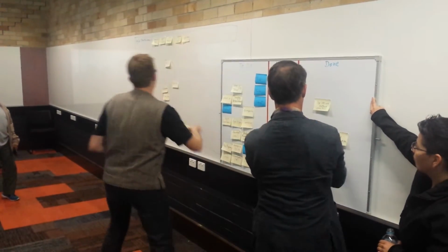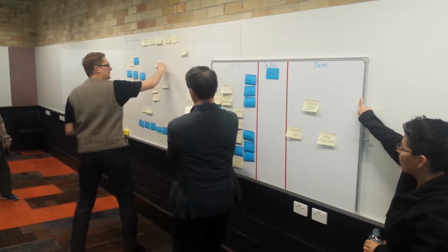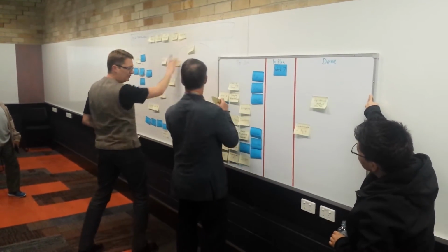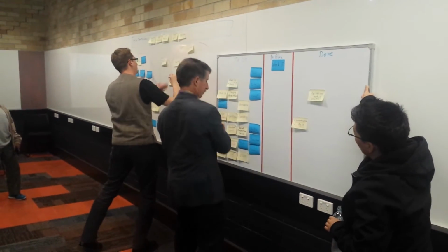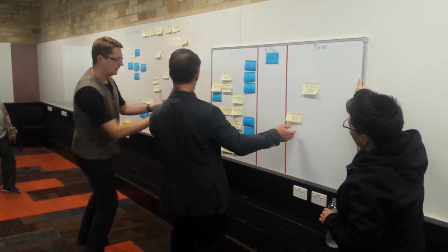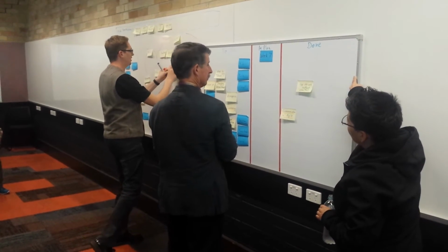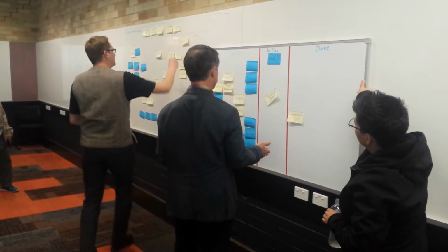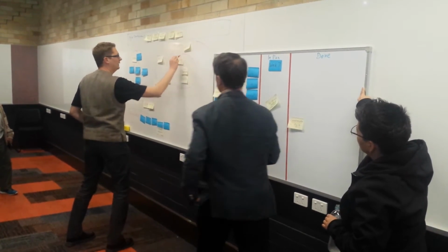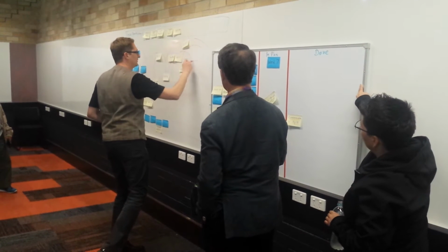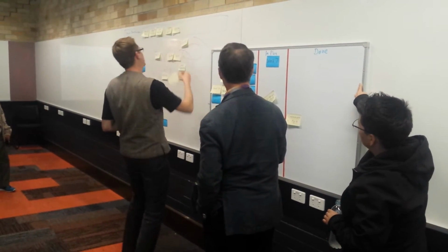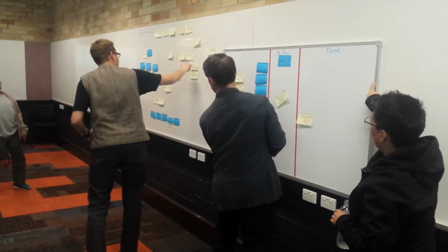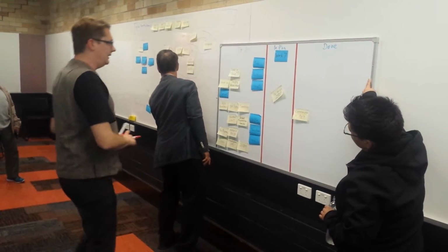Now we're going into Scrum, right? So this one here is where your Scrum is starting. So you're creating your task board, which is your sprint backlog, from your product backlog. So you're going in a sprint, you self-organize, you have your agile roles, and, well, we're coming to this, we're adding this later. So we're doing these sprints, okay, in Scrum. After each sprint, we haven't done this, but we're doing a retrospective, which means the team needs to think about how we're doing, right? So each sprint has a task board which we're trying to achieve. We self-organize, we have the roles in play.